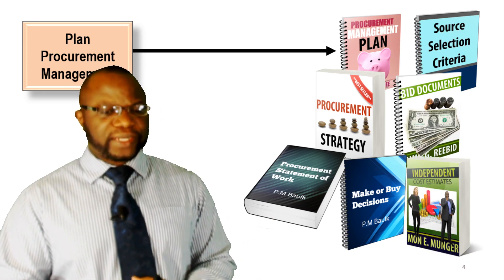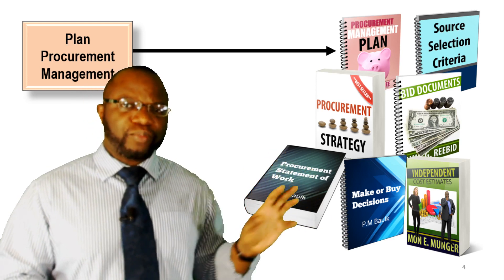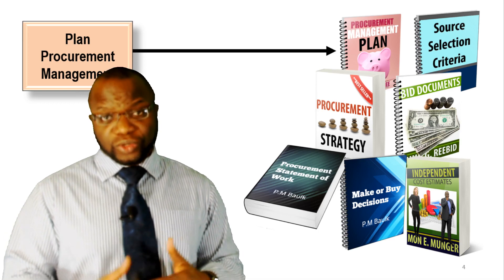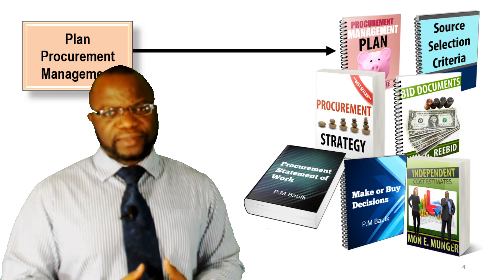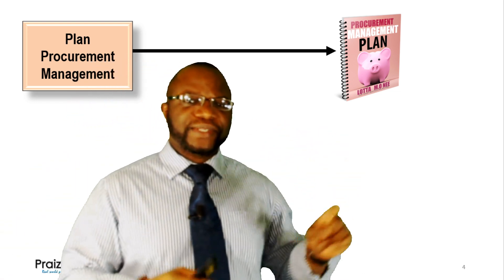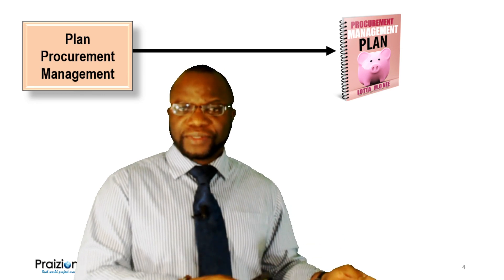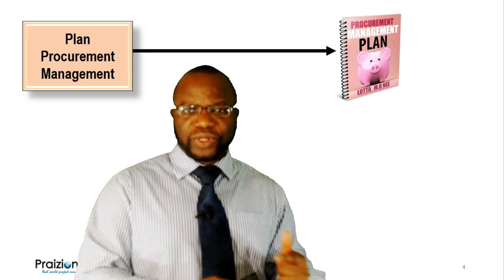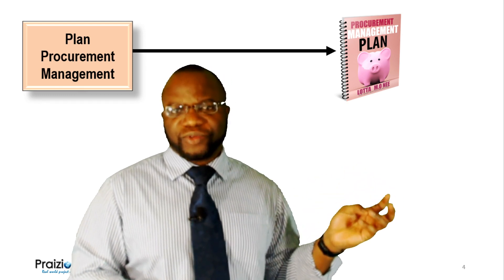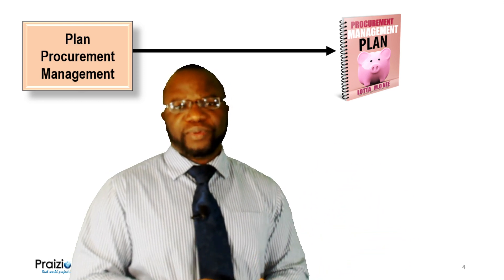And then we've got independent cost estimates. When you take a look at just the outputs, it could give you a run for your time as you go through the content. So a little introduction to each: the Procurement Management Plan is a plan for how to manage the procurements and the contracts that you will use — ultimately, how are we going to manage procurements on the project?